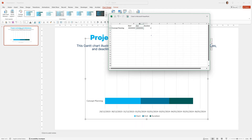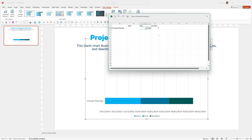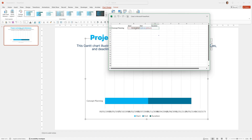We need to extend the columns so we can see them. Then the end date — for example 01/02/2024. To get the duration to work, we simply say equals the end date minus the start date, which gives us 31 days in this example.